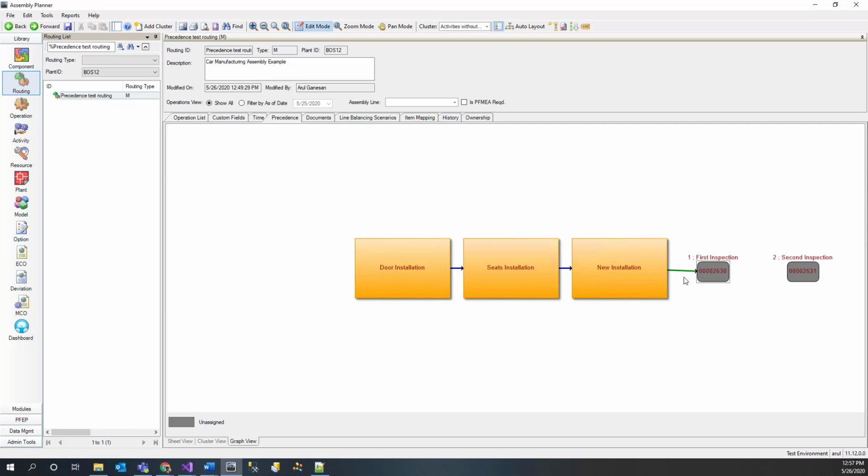The color of these links varies depending on what they are in connection with. If there are two activities linked together, the link's color will be black, whereas if you had connected a cluster to an activity, then the link's color will be green, and if you had two clusters linked together, the link's color will be blue. When having hundreds of activities and clusters in the view, the color of these links could help us identify what they are in connection with.